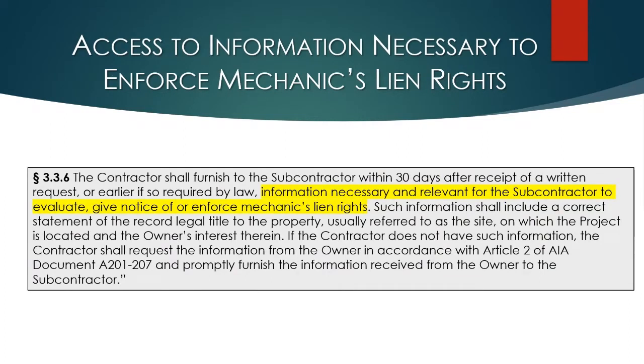Here, this provision, again from the AIA, discusses your information, the information you need to perfect your mechanics lien rights. Not as applicable in Florida. In Florida, the construction lien law includes a notice of commencement, which we're probably all familiar with, and that is where you get your information on a Florida project for your notice to owner and your claim of lien, and you can rely on the information in a notice of commencement.